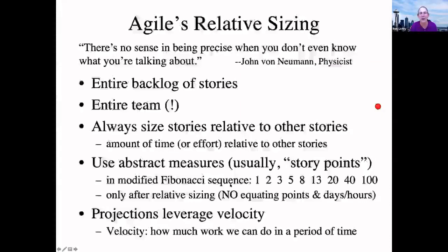So what does this look like? First of all, we've got a couple of different techniques. I'm guessing a whole bunch of you have used planning poker, but a whole bunch of you probably haven't. The way planning poker works, everybody on the team has got a set of these cards, our modified Fibonacci suite. Somebody reads a story, and everybody picks a card that represents how big that story is. On a given signal, everybody holds up their card. And if everybody holds up an 8, we write an 8 onto the card.